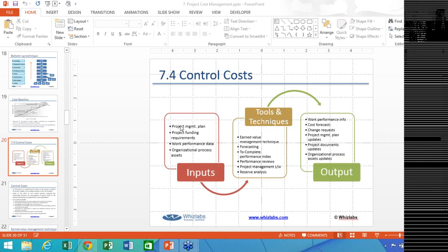The positive side is that I would be able to complete the project within the given time window, and the flip side is I will be increasing the cost of the project, because more resources means I need to shell out more money. So these are the two means and mechanism through which we can really salvage a situation, do some kind of damage control. Is it clear, Vijay?